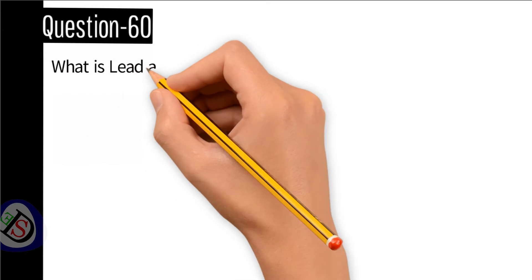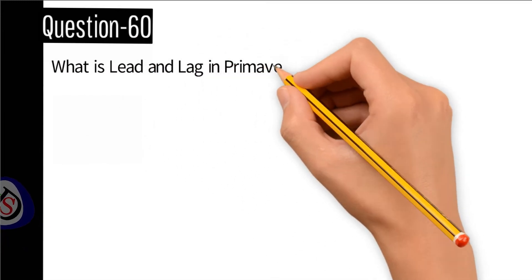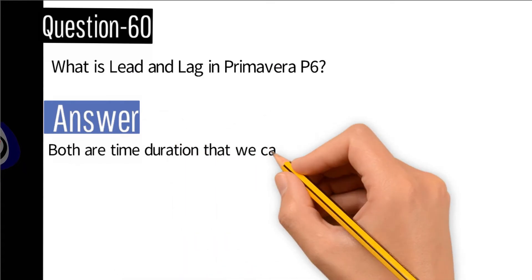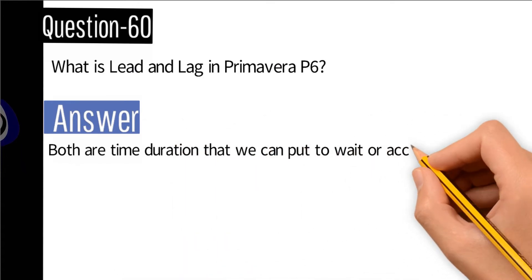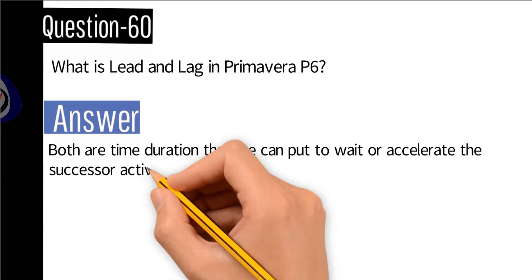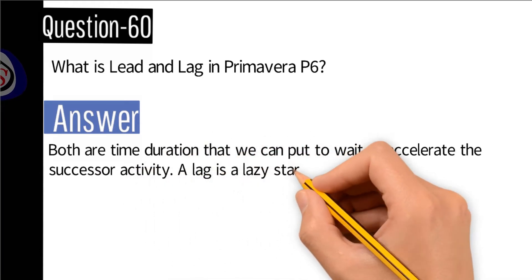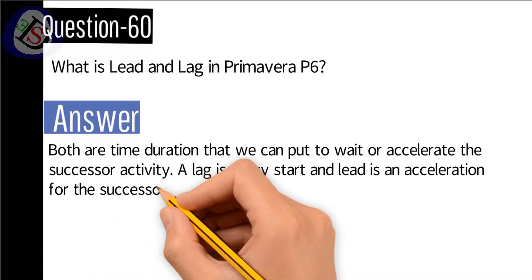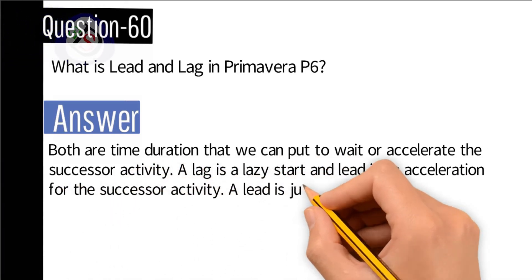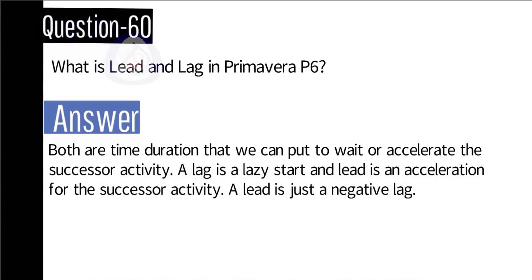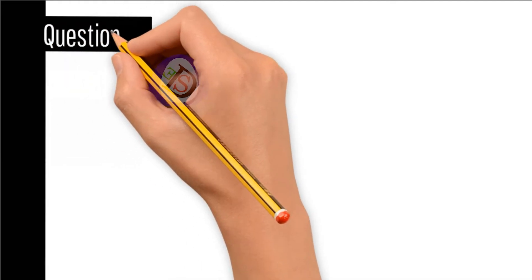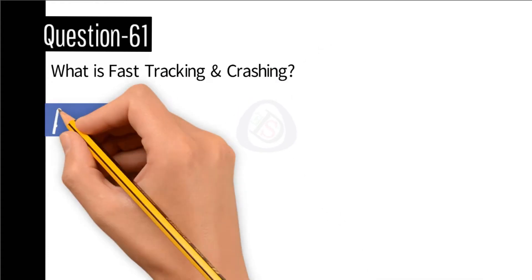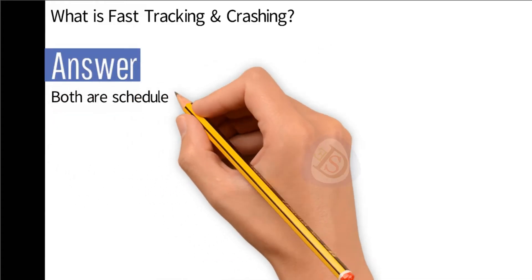Question number 60: What is lead and lag in Primavera P6? Answer: Both are time durations that we can apply to delay or accelerate the successor activity. A lag is a delayed start and a lead is an acceleration for the successor activity. A lead is simply a negative lag.